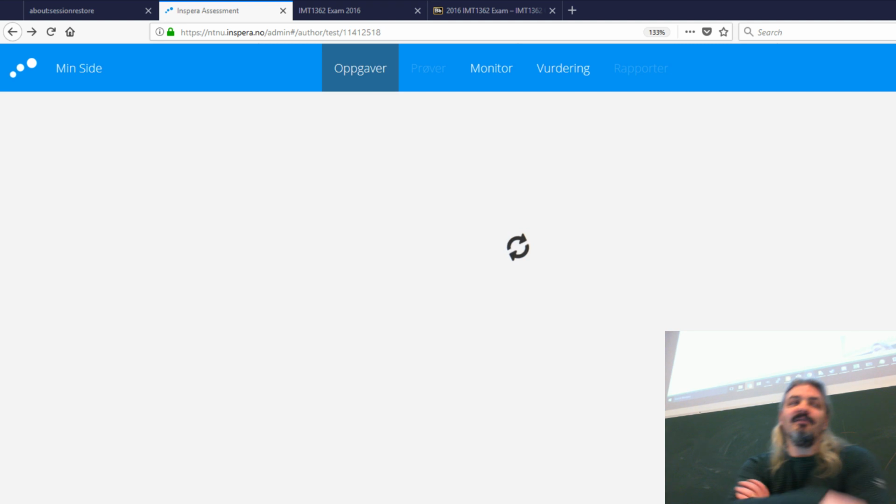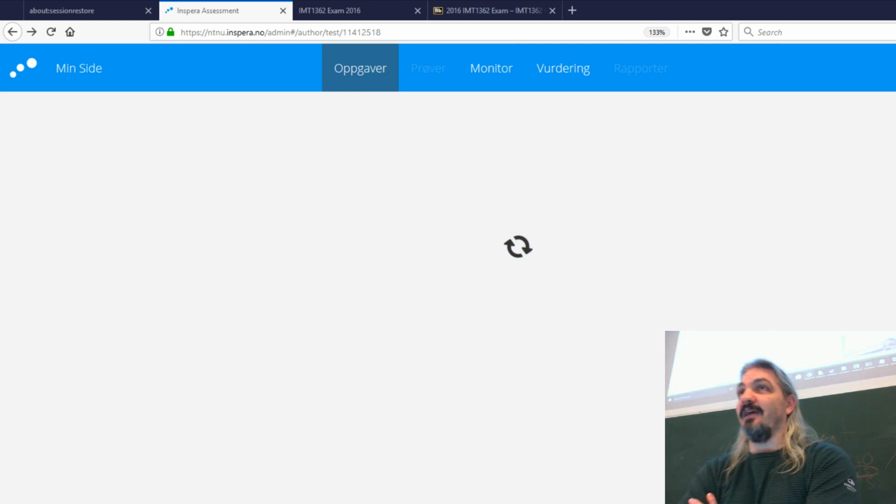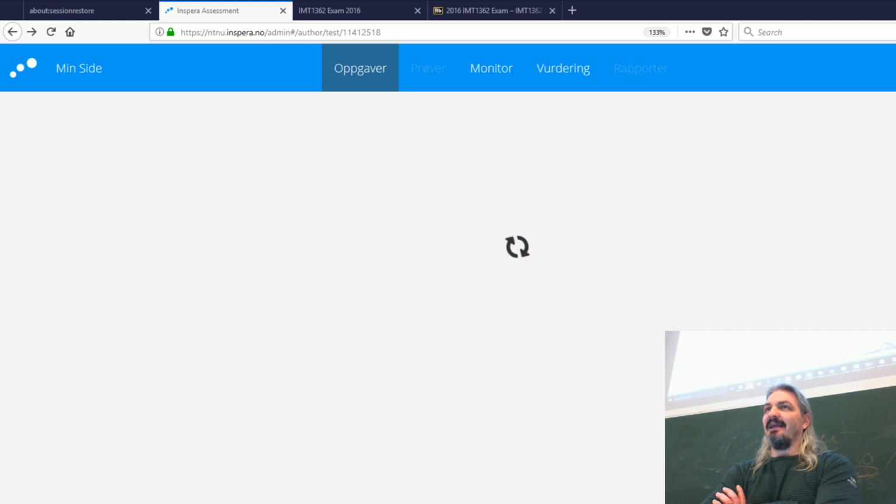In the Scrum methodologies, from the animal models I'd use, basically the Scrum Master is the wolf, a kind of wolf combined with owl and rabbit. The Scrum Master is there to help with meetings and to help make sure people have done predictions and to run the meeting, but not allocate roles. They don't tell you what you're going to do. They're not managing the project and saying, all right, you'll do that, you'll do that, you'll do that.